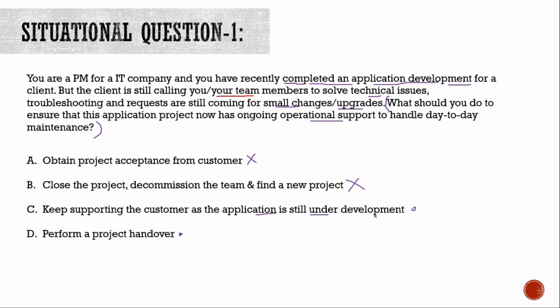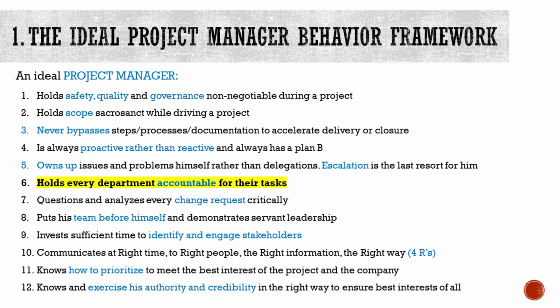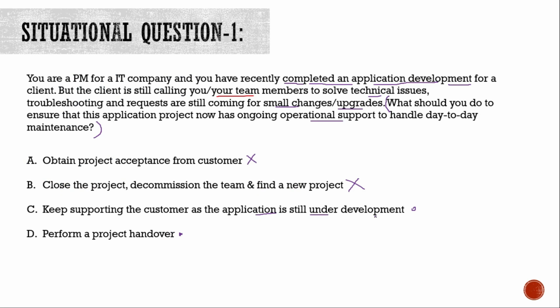always hands over the project to the customer or to the next department, and it also comes from the project manager behavior framework, where it states that a good project manager holds every department accountable for their tasks. Okay, so a good project manager, after doing the project, always hands it over to another entity, which may be the client, the customer, or the operations department.